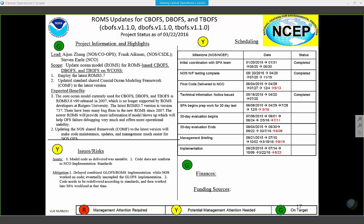So we sent this back to NOS, and they're reworking some of it. They had to do a little more evaluation. And what I've done with this one at this point is pushed it out because with resources, I have an NOS spa, and right now we're working on two NOS projects. So I told NOS we will pick this up when we're done with the other two. Okay, so is this another example where spa time was spent on an implementation that got pushed? So wasted work or?